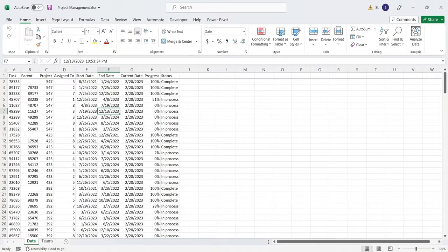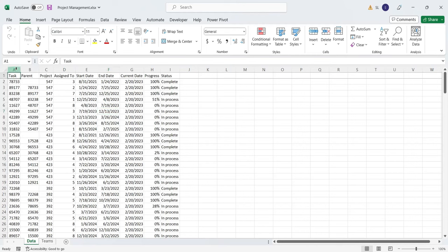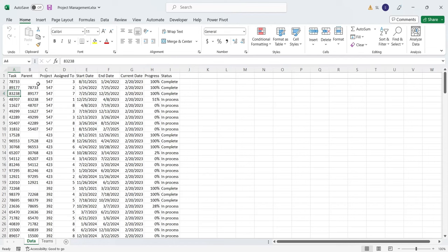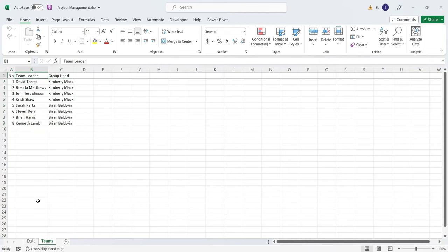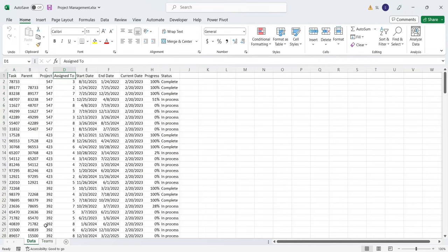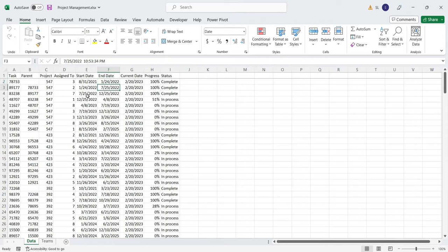We will use the following data for our project management dashboard. The first column contains the task ID. The second column contains the task ID of the parent task. The third column contains the project ID. The assigned to column refers to the team head defined in the teams sheet. Each task has their start date and end date.